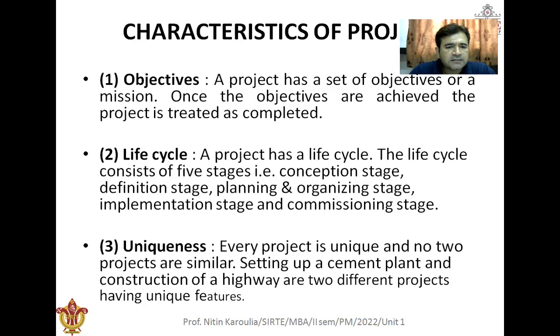Okay. Then second comes the life cycle. A project has a life cycle. The life cycle consists of 5 stages: conception stage, definition stage, planning and organization stage, implementation stage, and commissioning stage.